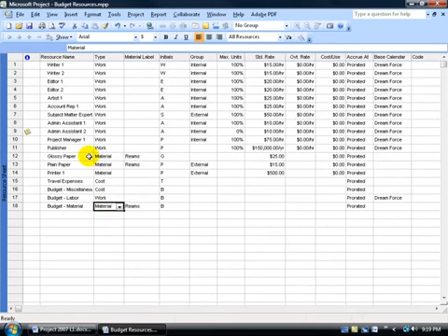Every time you assign one, that takes up 1 unit until you assign up to 11. Or maybe the glossy paper, half of it got shredded in the printer, so we had to purchase another ream, so we're up to 12. Again, in another view I'm going to show you, all you're going to do is go, oh, now at 12 units, and we budgeted for 11 units. So it's more of an FYI for you to keep track of and not have to open up an Excel spreadsheet or another view to compare what you budgeted aside against what's actually being used up as far as work, materials, and cost, in this case for travel expenses.